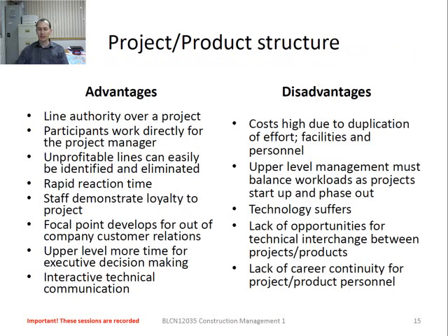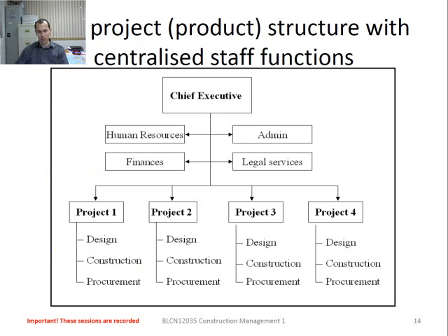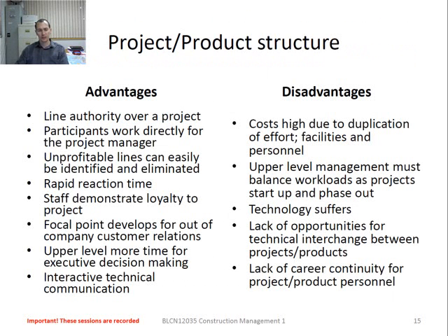Typically what we'll see is, if I'm just going to run back one slide, these staff members that are in these projects, they are particularly loyal to their own project. Right, so it's difficult for this construction manager, for instance, to go and work on that project if project number 3 is in trouble. So that's something that we have to keep in mind. The disadvantages, obviously, cost. All right, because we are duplicating all of these functions, it makes it more difficult for us at the end of the day to save money over here. Technology advancements, because we're working in silos, the technology is not advancing as quick as it could.